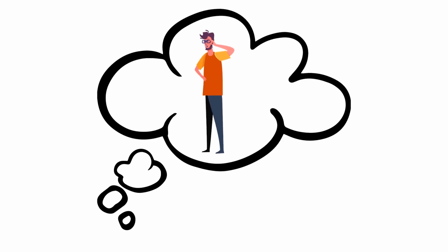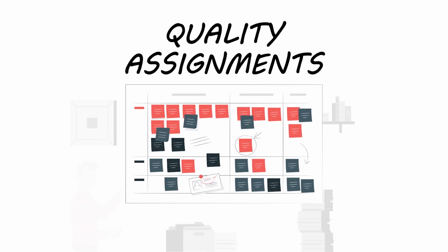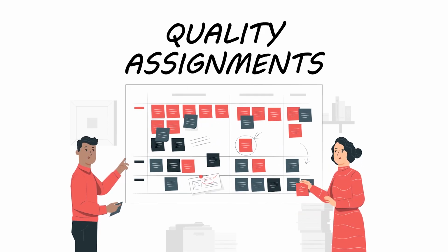Choosing from what can be done to what will be done is termed making quality assignments. Only quality assignments may be put in a weekly work plan, shielding the production from uncertainties and ensuring plan reliability.